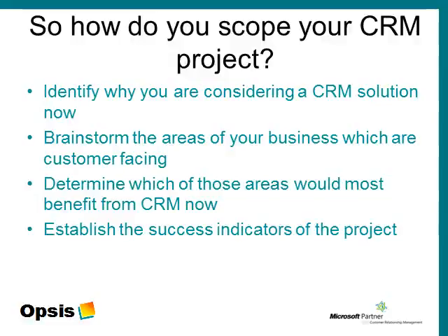We establish the success indicators of the project at this stage because many projects, once completed or abandoned partially completed, are deemed to have failed. If we know our success criteria, we can work to those criteria and ensure that we meet them. Success criteria should be measurable, i.e., an improvement in sales is less effective as a success criteria than an increase in sales revenue of 15%. A project that has met all its success criteria cannot be called a failure.